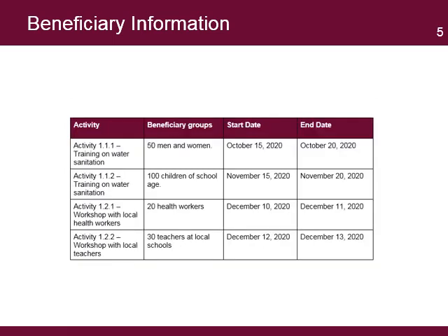A method to track progress is to track the activities the project beneficiaries have participated in. This information feeds into the output indicators to track the initial results the project is achieving. The list includes all the beneficiaries' activities and their start and end dates.